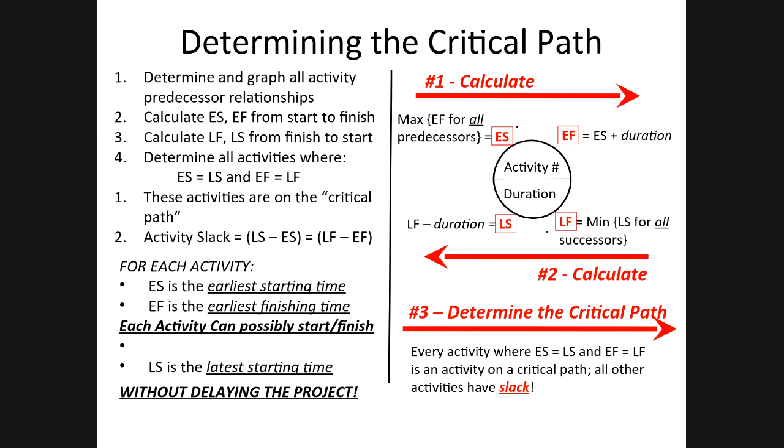Again, you've seen this slide a couple of times now. The PERT technique is still going to rely on the process of determining the critical path. The thing that's going to be different for this work that we're going to do today is going to be focused all around the duration, because for the critical path method, the duration was fixed and constant. But for PERT, probabilistic evaluation and review technique, as the name implies, the duration is random.